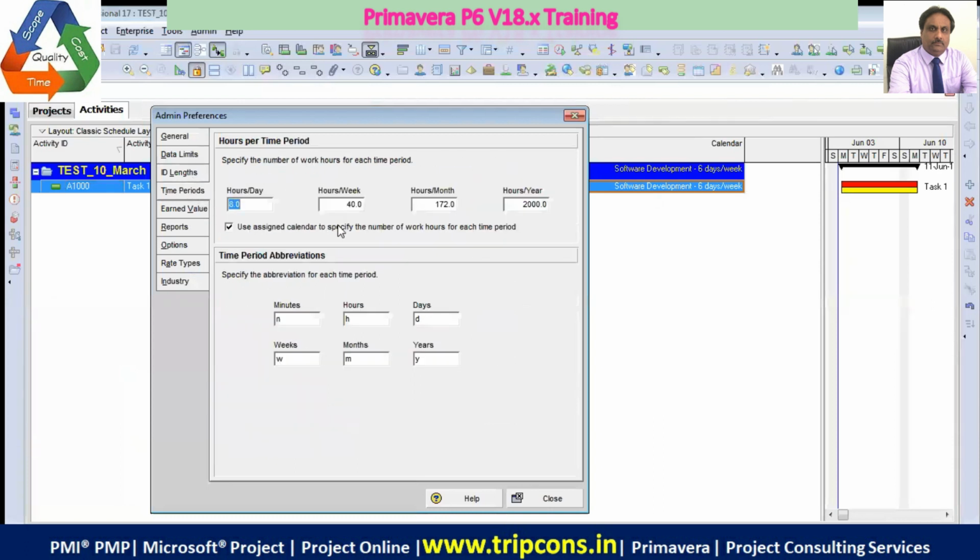Time periods, so let's come here. Time periods. So everybody is at the time periods. Yes. Hours per day is 8 in case you are having a 5 day week organization. So hours per week will be 40 and hours per month will be 172. Okay.